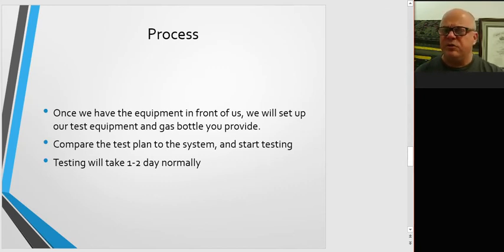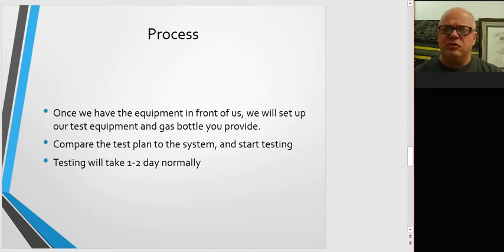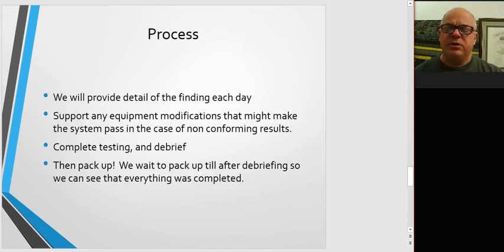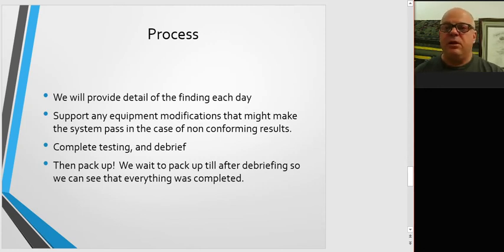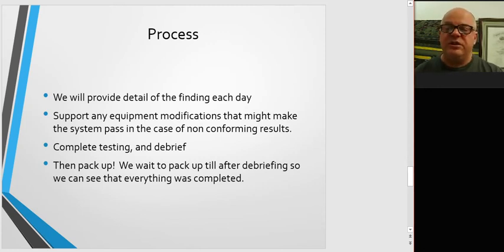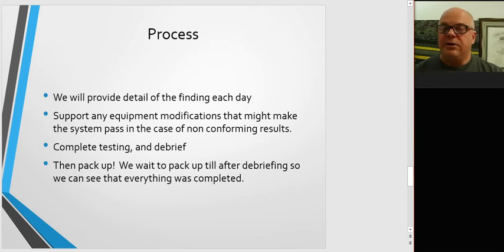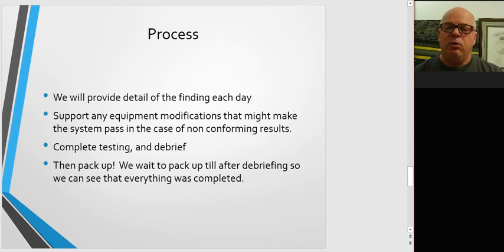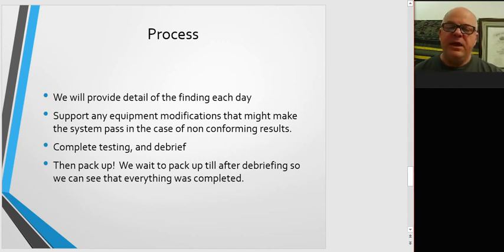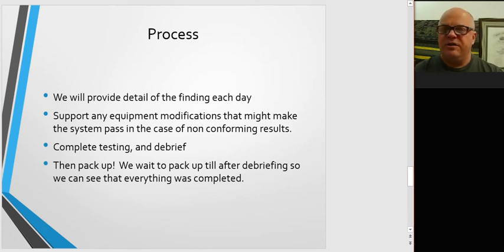Testing normally takes one to two days, sometimes a little longer, but that's unusual. That's a really big system. We'll provide detailed findings each day, and we'll support any equipment modifications that your team needs to make for the system to pass, like changing louvers or closing louvers, or if somebody needs to take a door off to a shop and cut some holes in it to allow more airflow, we'll help you understand that. Then we'll complete the testing and do a full debriefing of where we are, what we found, and what's been developed.